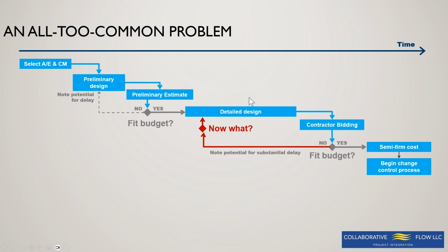But the problem is what happens if you get all the way through here. These designers are already supposed to be off on some other project. The contractors have already bid this once, and we can't get the project started. This is an extremely disruptive system. So when we talk about shielding, I'd like to draw a line right here so that we're shielding the whole design effort using some of the same concepts that Fernando just shared about advanced work packaging.